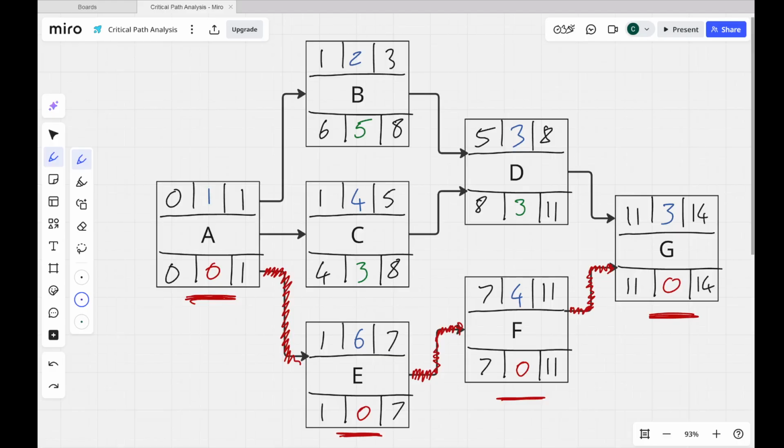They should show this, arguably, but because Gantt charts get fudged quite a lot, and people don't think about this network, don't think about the precedence, don't think about the relationship between tasks, you end up with all these kind of wacky schedules that don't mean anything. For example, every task has to have an arrow going into and out of it, apart from the first and last task. You can't have tasks just floating around in the middle of nowhere with nothing going into or out of them, because it makes no logical sense.